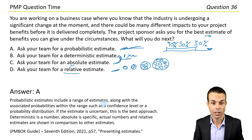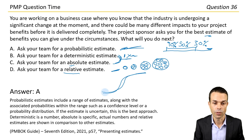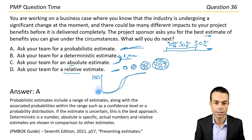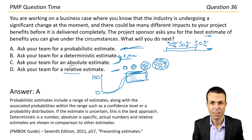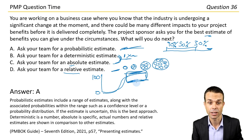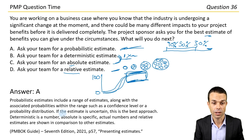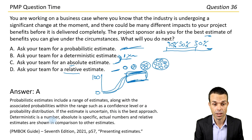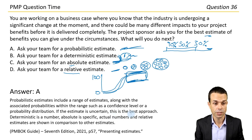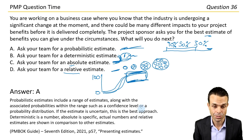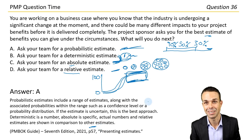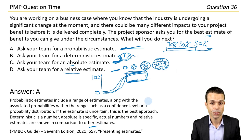Probabilistic estimates include a range of estimates along with associated probabilities within the range, such as a confidence level or a probability distribution — like a cumulative distribution where we get to 100% and at a certain stage we have the highest probability. Deterministic means a specific number. Absolute is also a specific number. Relative estimates are shown in comparison to other estimates. Page 57 under presenting estimates in the PMBOK Guide 7th edition.